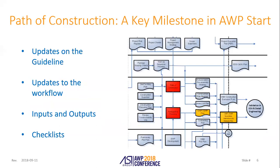Path of construction is something that, if you look at our COAA website, is fairly dated. We've spent the last two or three years updating it, and this year we'll go live with our new path of construction procedure with updates. We're definitely updating the workflow to align more with AWP, because when we first set it up we were only looking at workface planning, not AWP. We've got new checklists to go along with it — it's a brand new procedure. It won't be coming out until late this year or beginning of 2019.